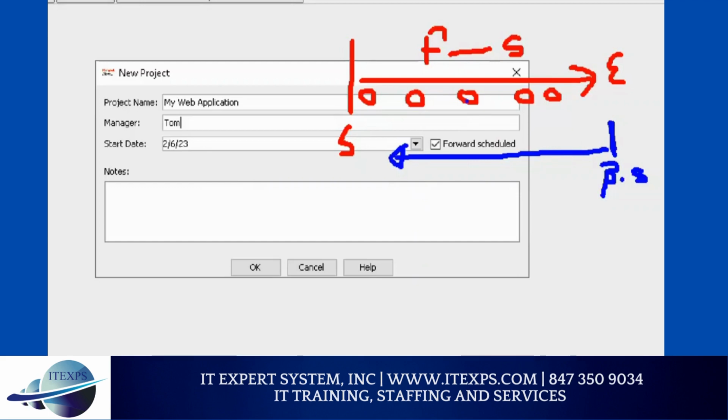Forward scheduling is one of the most popular ones, but there is pressure-wise scheduling. People also do backward scheduling if there is a compliance issue, or some special stress or pressure coming. In that case, you write the end date first and then start doing reverse planning, right? Most people like forward scheduling, but there are cases where you do backward scheduling.